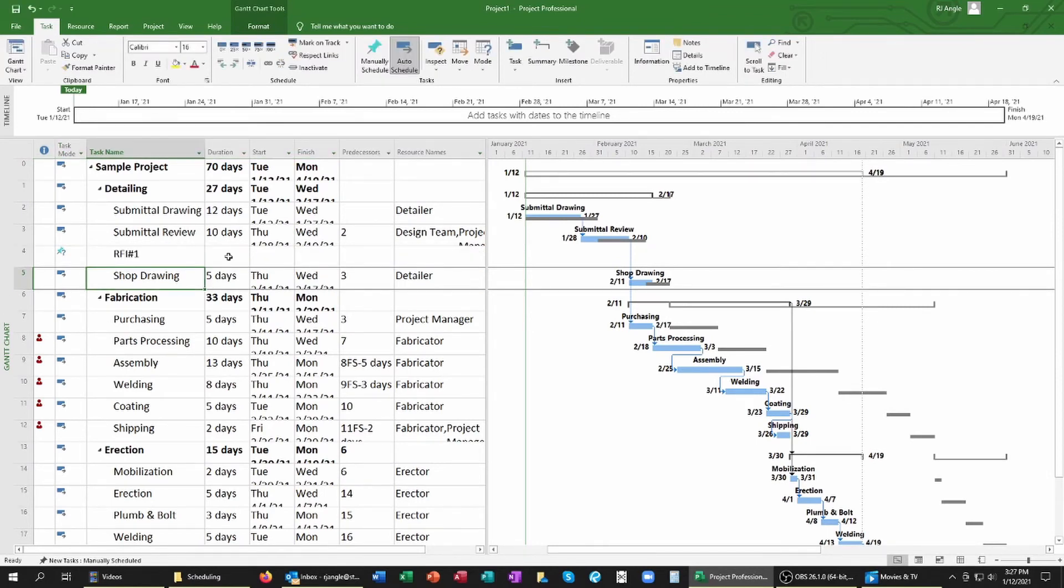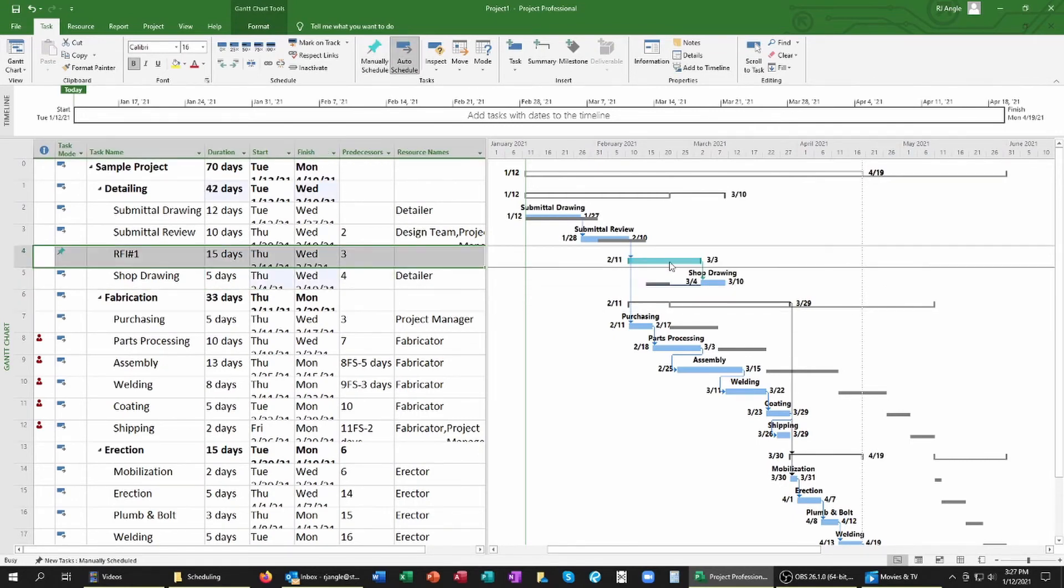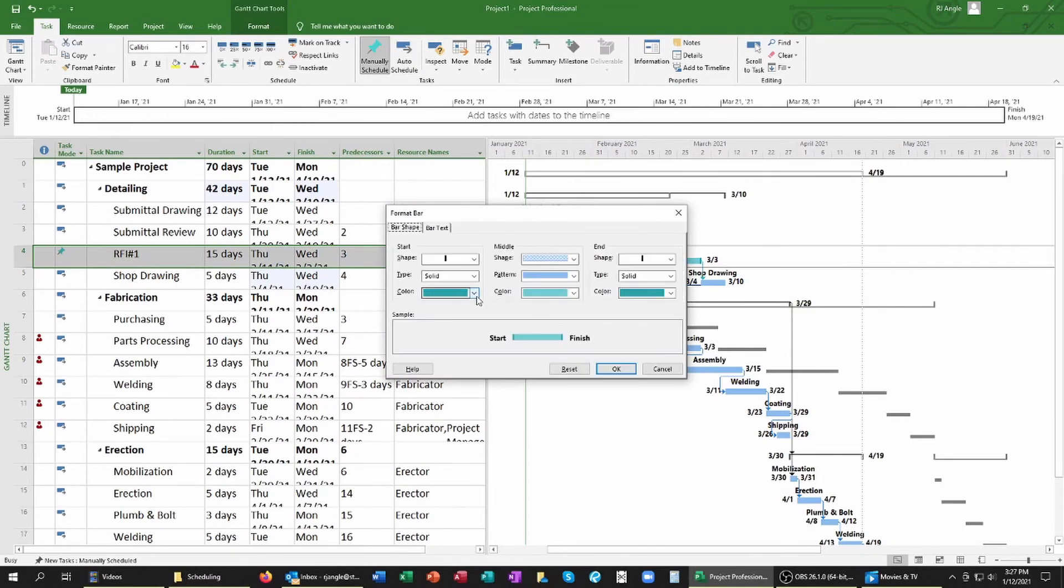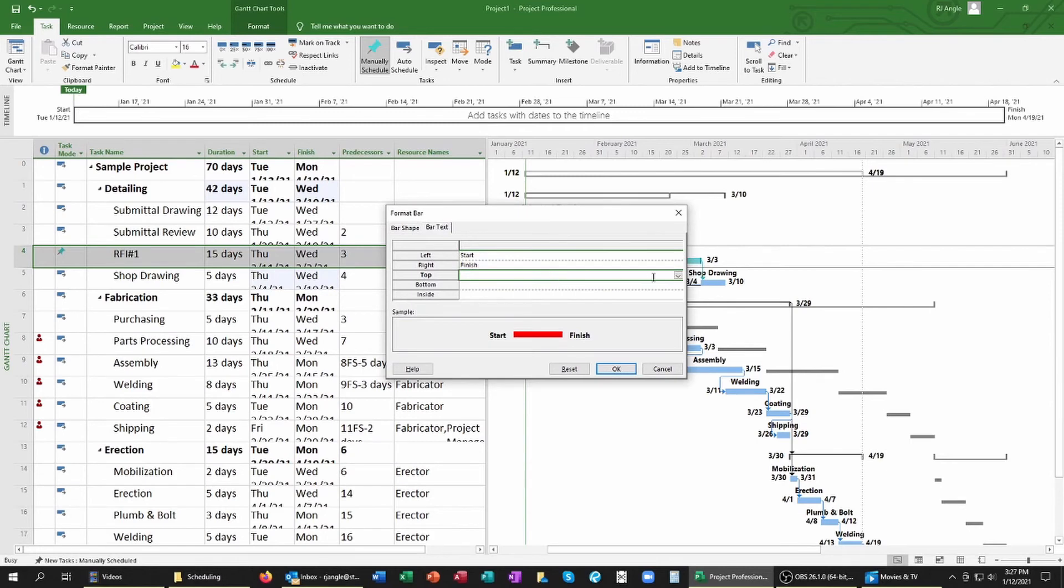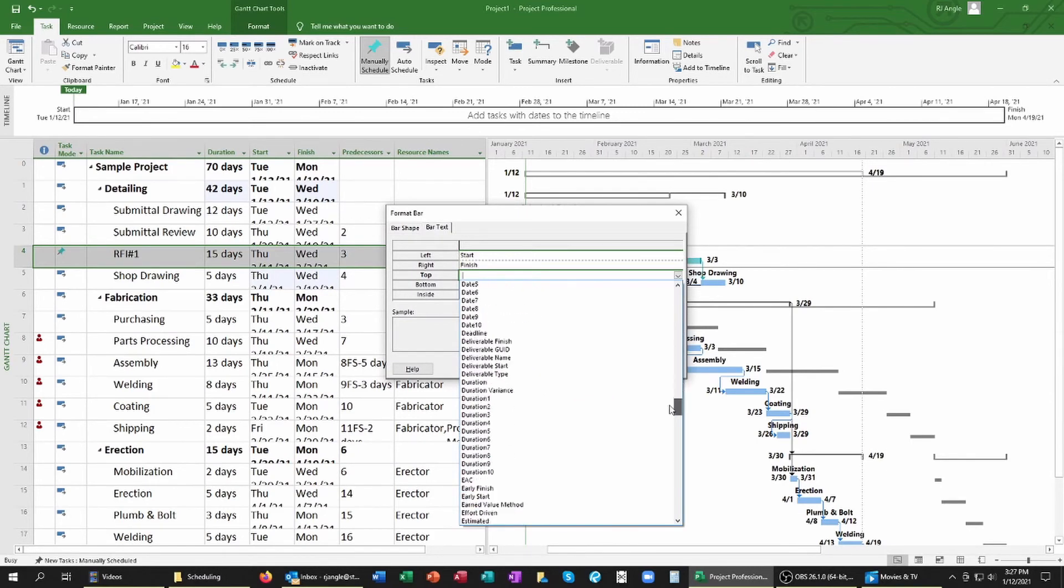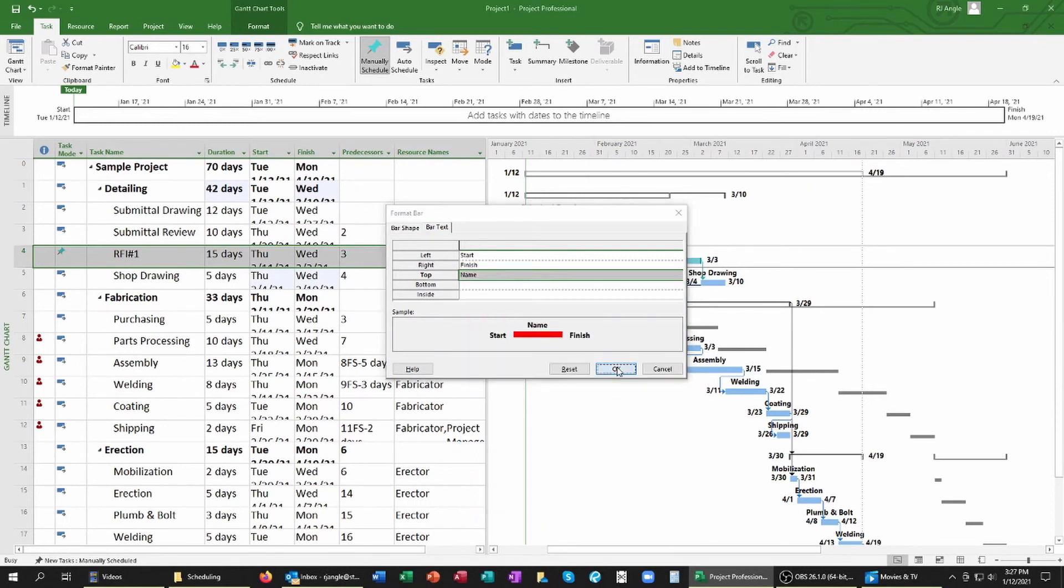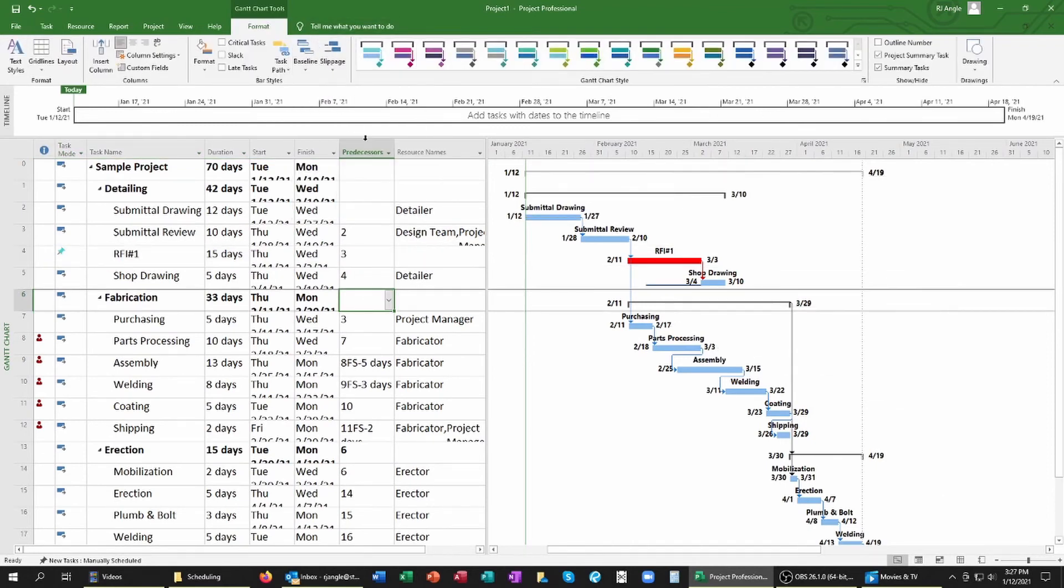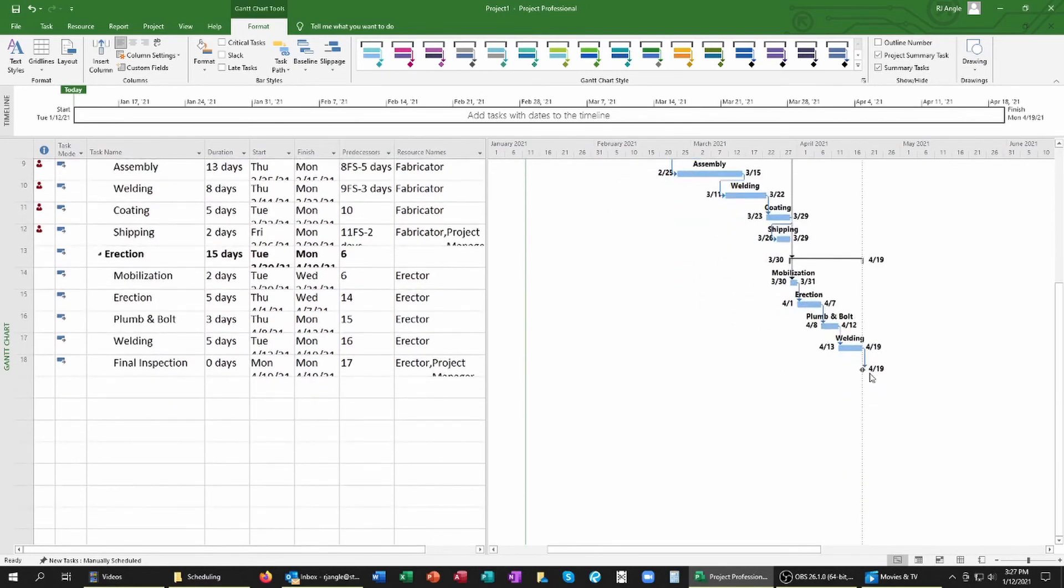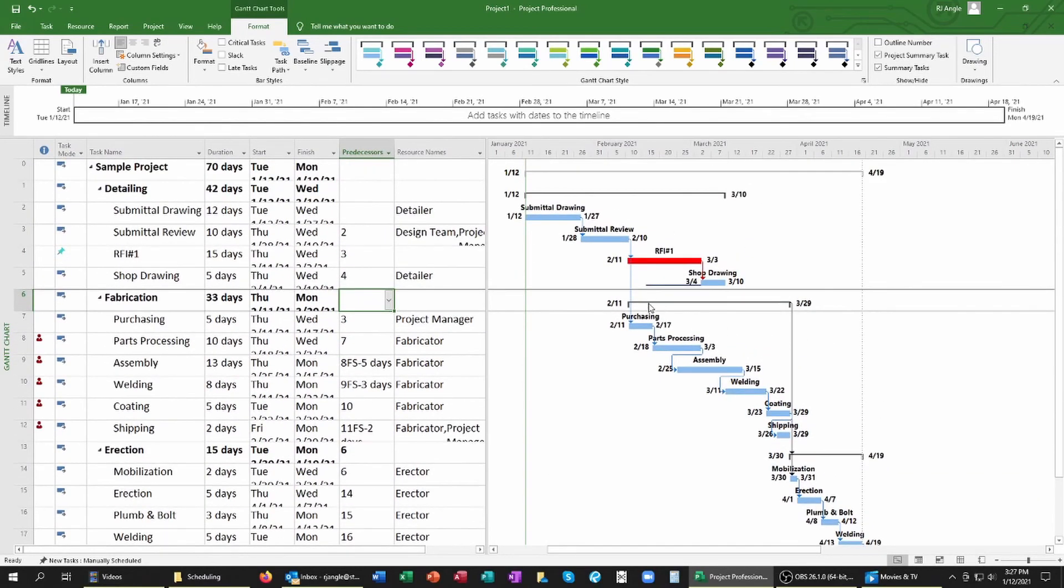Meaning that you need to drive keeping each one of these tasks happening and on time. But additionally, and perhaps more importantly, you need to document schedule impacts and revisions. Whenever someone or something alters the course of your schedule, you should note that in a schedule update. As I mentioned at the beginning of our video, schedules are dynamic. These are living documents that should begin with expressing how you intended to do the job and finish with journaling how the project actually came to completion. This can sometimes feel like the easiest and the hardest part of scheduling, but it's critically important that you do it. Documenting the events that impact your schedule is a duty that you should take upon yourself. You can be sure that you're going to want this information when it comes to billing for your retention and settling change orders. So the lesson here is be sure to do it.